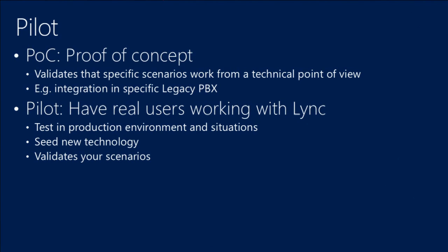The proof of concept probably mostly done in a lab environment where I want to prove that Link can be integrated with a specific PBX, and yes, I can call from one side to the other, I do all the tests, and I know it works. The pilot on the other side, I need to get real users, I give these real users scenarios, so that they can test out in their production working day, if they can work with Link, if it meets their requirements, if it makes their life easier, if they want to use that.